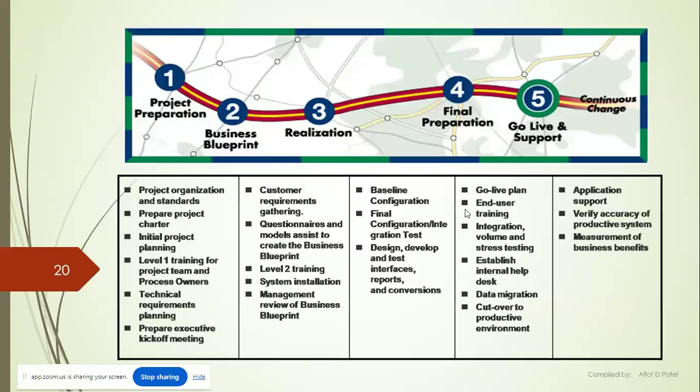For implementation, why did I say 6 months? This is the total cycle of implementation. These are the different phases of implementation. First you do the project preparation. You need to have people: a project manager, and module-wise an expert, a basis expert, a web expert, then all your hardware maintenance and network engineers, everything all together.